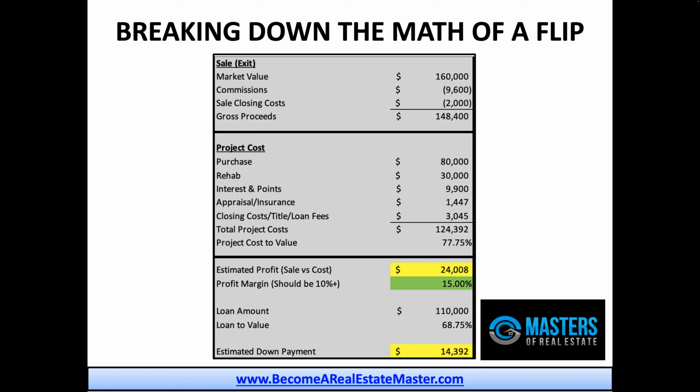Maybe some of the other ones that you want to include are your marketing costs, so you can build that into every deal and see what your true profit is after your marketing costs involved. There are other miscellaneous costs, some utilities and things like that. Usually I build in the utilities and the renovation buffer and inspections into the rehab costs, so that that's all included in my renovation costs across the board. Okay, it works out better for the financing if you're able to include those costs inside your rehab and not coming out of pocket for those items.